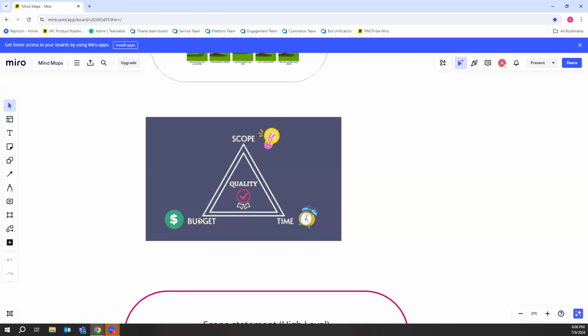But if you think about what the scope of the project was, in 2010, well, in fact, if you remember correctly, I don't know if you guys maybe looked at the case study, the initial plan was to have the Gautrain done by 2009, right? When they started exploding, they found that there were more rocks than they anticipated, and there were a whole lot of other complications. I don't remember the exact details now, but I think there was a lot of dolomite as well, and at some places the ground wasn't stable enough, and that was not anticipated.